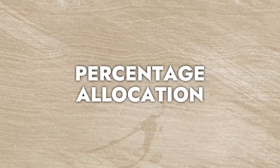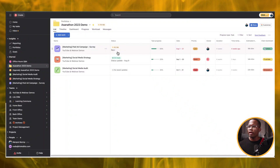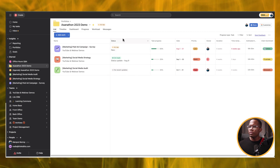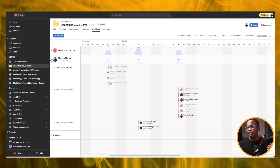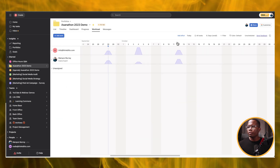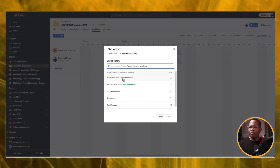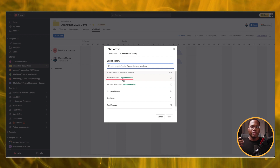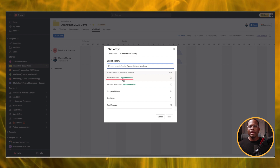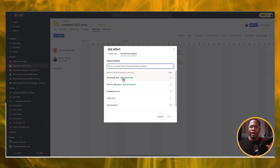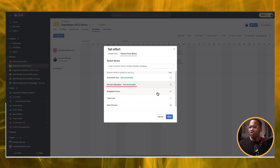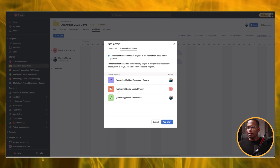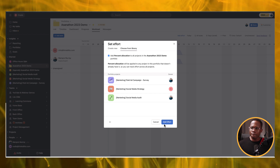The first thing I'm going to be looking at is the new percentage allocation. You need to have the business plan to look at this. If we go to our portfolio — I've just brought in some dummy projects here and added some due dates — and if you go to the workload, traditionally we would have had to set an effort for this. The default is simply task count for any of our workload options, but if we add the effort we were previously asked to set it to estimated time, and in our projects it would add the estimated time field so we'd have to fill in that information to get our team's workload capacity.